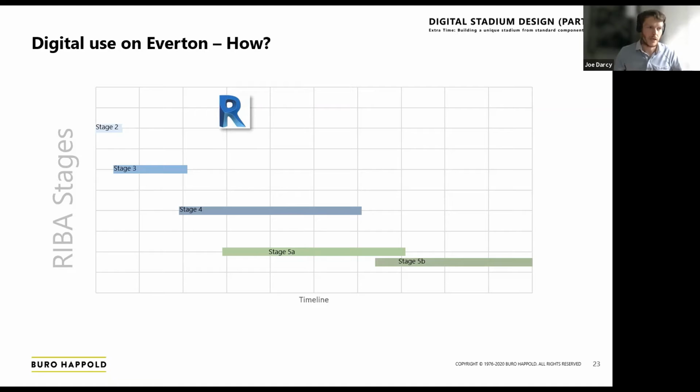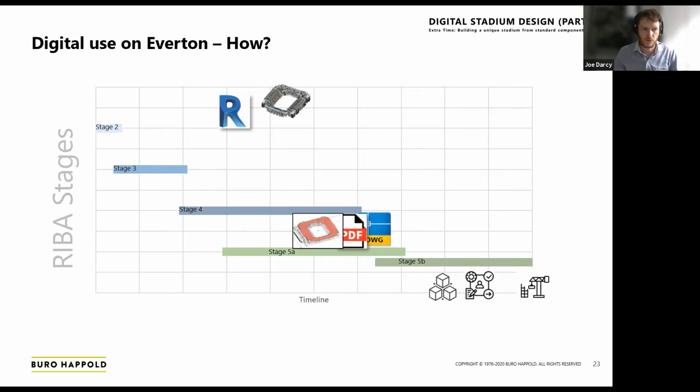You can see here the sharing of several Revit models across to Laing O'Rourke whilst the design was happening and changes were still happening. So in the end, I feel that allowed us to provide the information earlier to them and facilitated them doing their processes quicker, and hopefully relieved some of the pressure on the tight construction timeline.